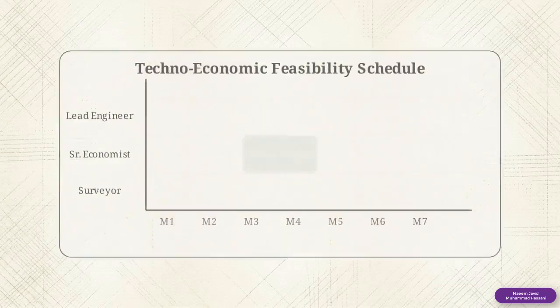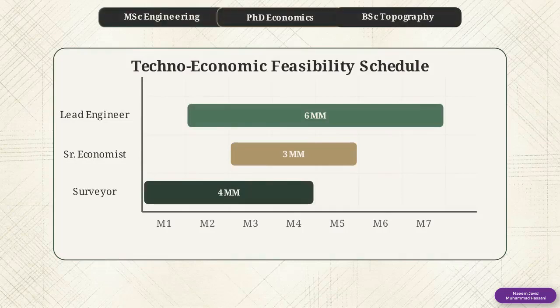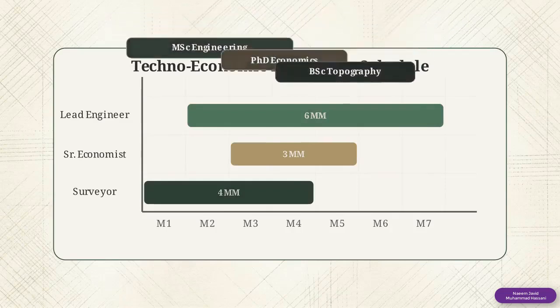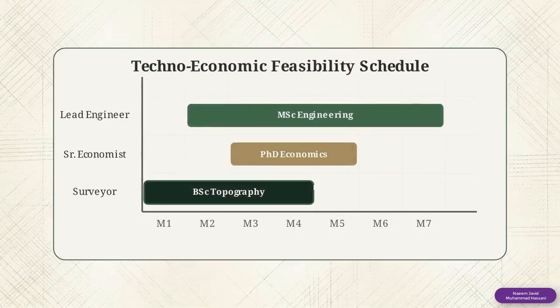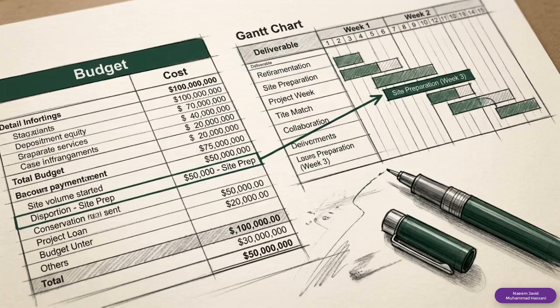The manual requires that every consultant assignment be mathematically justified on a man-month basis and visualized on a Gantt chart. Contract durations and specific professional qualifications must align precisely with these man-month blocks. Combining a granular financial breakdown with mathematically justified TORs proves to the approving forum that every rupee in budget is linked to a specific deliverable.